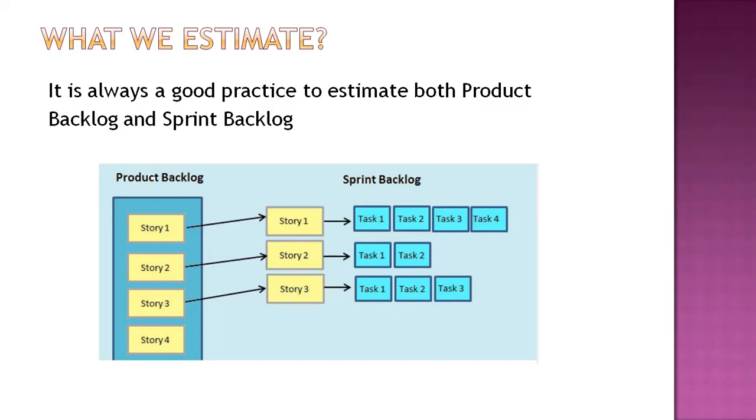One thing is to create a particular status called invalid or removed or something, so that it will at least not show up in your board or in the product backlog, or at least show with a different status. Otherwise, start reusing those stories for other purposes. If you feel, "I don't want to have that record anyway, it is not going to help me in future because that requirement itself is completely gone," then let me reuse that. But frequently keep on cleaning up this product backlog.